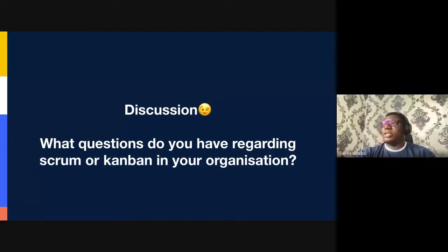Okay, yes. So I would take the first one, and the second one after. So the first one, you did a retrospective. Your team lead asked you to document the action points and what can actually be done to improve things. The retrospective is where the entire sprint team needs to talk about what went well for them and what can be improved. You are also meant to talk about the action items on that same call. That's the first thing I need to highlight to you.